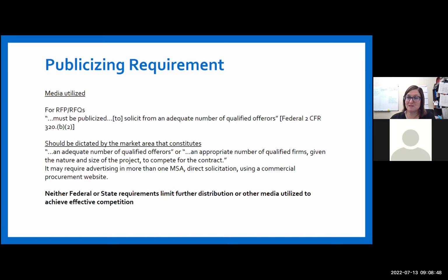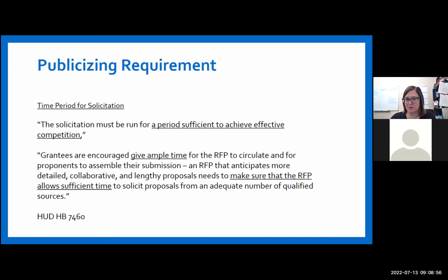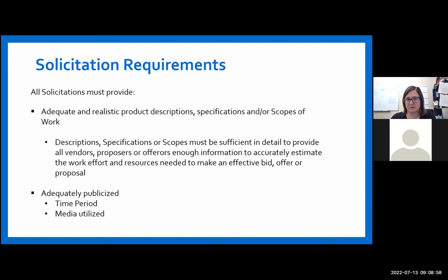You also need to direct solicit at least 10 firms for each RFP in order to hopefully get the number of responses you need.